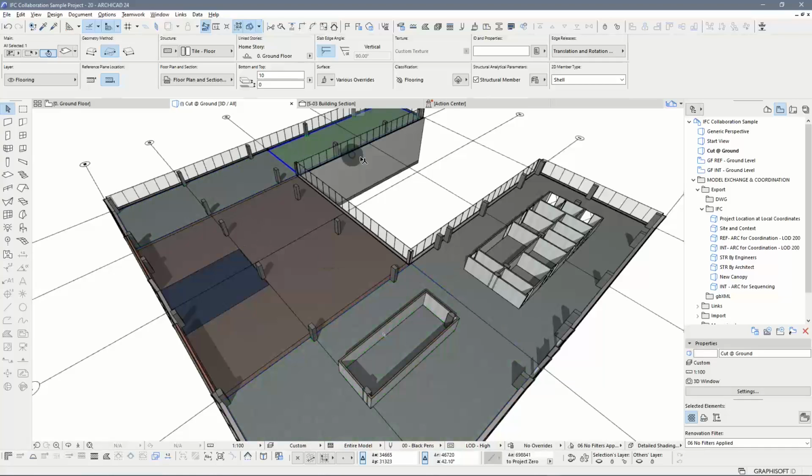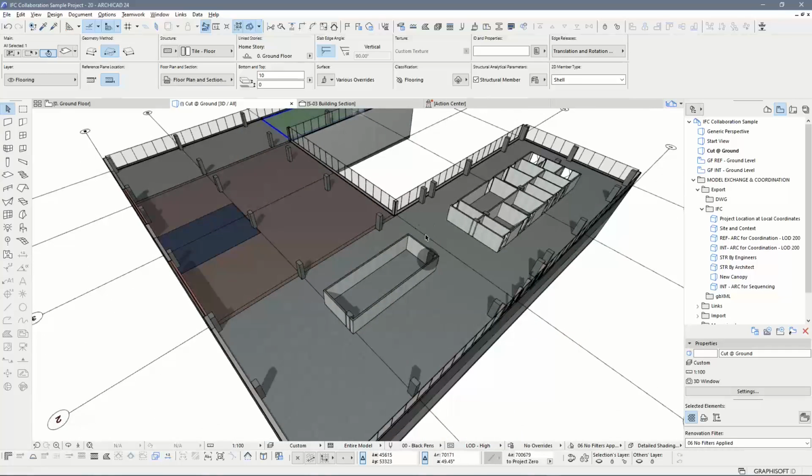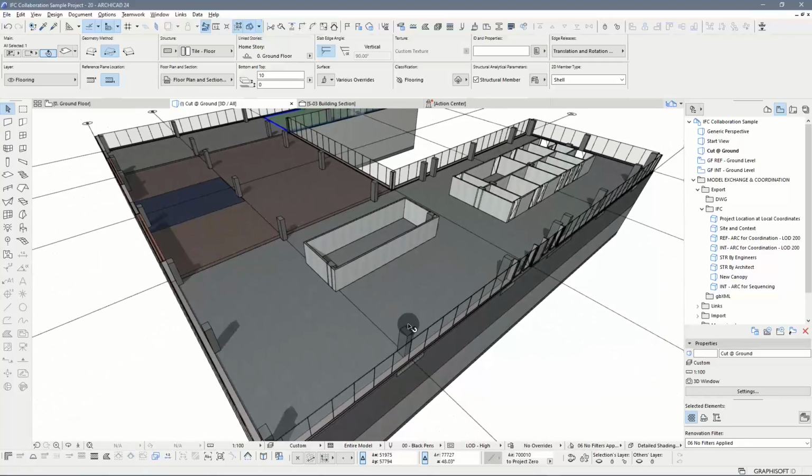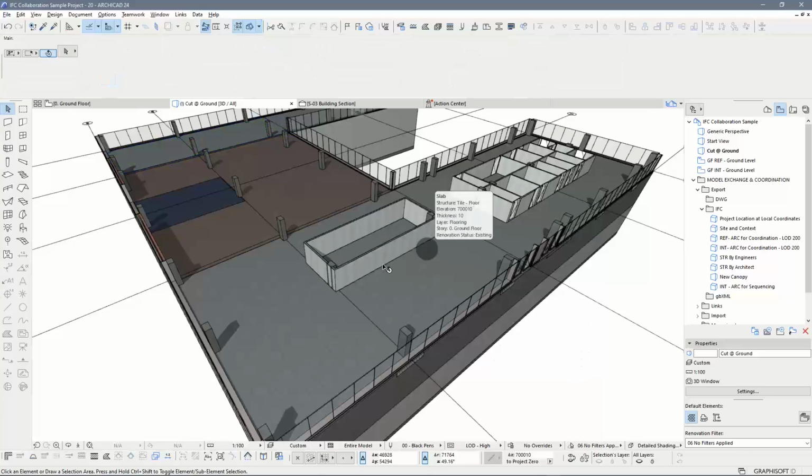So the level of detail that you add to the model, typically by splitting elements, is the kind of modification that you may find yourself doing only for the purpose of turning it into something that you can later on use for sequencing. So this is what I've done in this particular case. I've added, just splitting these few floors in here. I think I did it on the back there. Didn't do too much, but I'll try to show you that on the other side.